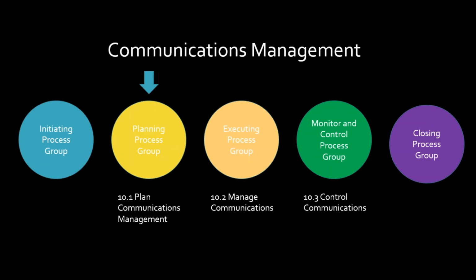But we're going to plan it, like I said, almost side by side with our stakeholder management. And then we're going to manage that communications to a baseline. What is that baseline? The plan. The communications plan that we develop is really the baseline to manage communications and control it. Just like anything else that we planned early, we're creating a baseline here, even though there is no such thing as a communications baseline anywhere in the methodology. We really are. And I want you to think that way because that's how you control stuff.